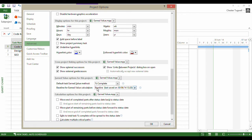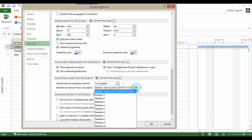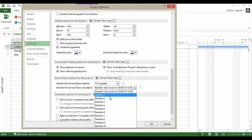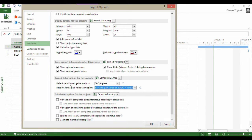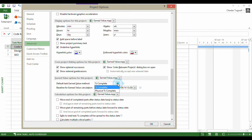Now you can only base your earned value calculations on one baseline. It's chosen the default baseline by default, but in this list you can choose which baseline you want to base those calculations on. We've also got an option here for earned value method - percentage complete. There are two options: percentage complete and physical percentage complete.